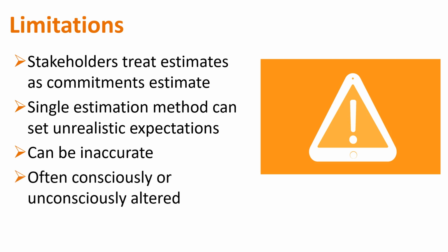Okay, so if you're not careful, it can definitely be inaccurate, particularly if you just use one estimation method. And I don't know about you guys, remember I have a development degree and I love developers, but when I ask a developer how long it's going to take, I increase it by a minimum of 25%, and that's on things that we work on all the time. And then if it's something that's brand new, I double it.